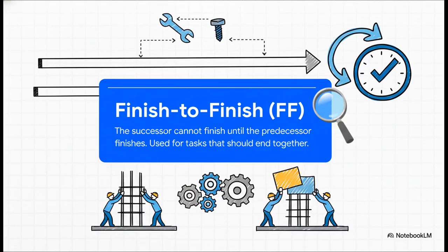This one is all about synchronized endings. The successor task can't be marked complete until the predecessor is also complete. This is fantastic for things like final system testing and commissioning, where 2 totally separate streams of work have to wrap up at the exact same time.